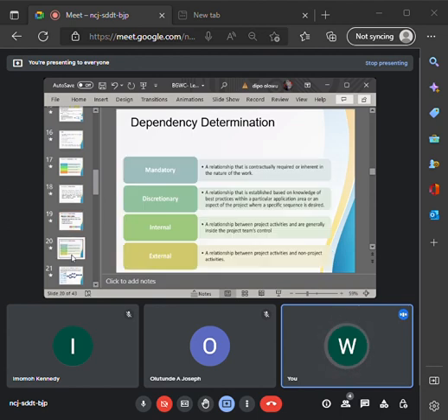When we say mandatory dependency, what we are trying to say in this context is that we are trying to come up with a logic by saying that we are performing this task in this logical sequence because it is expected of us by contract or by the nature of work. Hence, that is referred to as mandatory dependency. Like in the case of foundation laying, which explained that you must dig a hole before you do blinding. That digging and doing blinding is mandatory for you to follow. Number one reason, because that is how the nature of work is. Because for that particular nature of work, it is expected you follow that pattern.